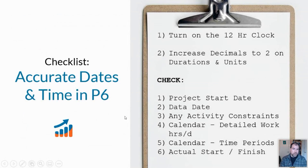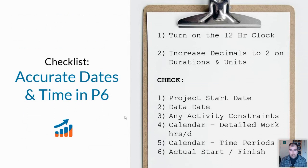Here's my checklist for you — you can screenshot this. To get accurate dates and times in P6: turn on the 12-hour clock in user preferences; also increase decimals to two places on durations and units, which will help you find these problems. Check your start date, your data date, any constraint dates, and your calendar — make sure things are starting and finishing at the right time of day. Check your time period settings in your calendar and your actual start and finish dates to make sure you have accurate dates and times.